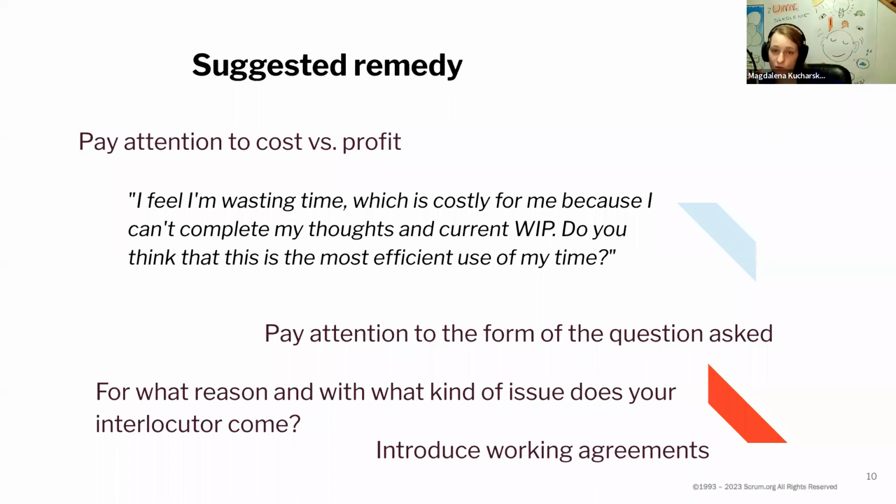One of the tips I also saw with one of my teams: between certain times during the day, for instance for an hour or 2 hours between 10 a.m. and 12 p.m., they had a concentration time, a no-questions time. That was the time for the Scrum team, mostly developers, to work on their own. Also the product owner and Scrum Master just focus on your own work, and the questions might come later. That's just one of the working agreements that you can have. So as you can see, questions might be great. How to handle those questions might be, in certain cases, a separate important topic to address.